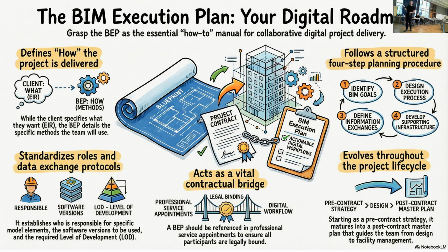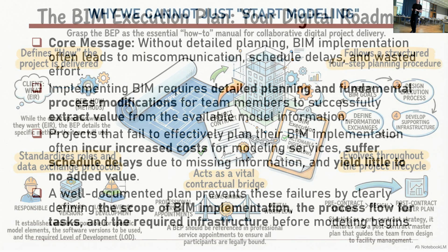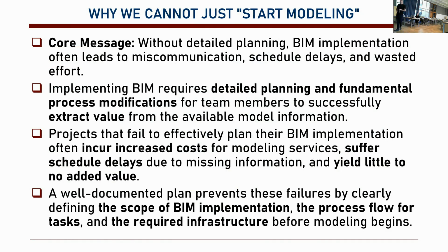Basically, that's the BEP. Prior to the project, we have a pre-contract BEP. Then it's given to the members, and they basically work on it. Then after the contract, it is updated, and whenever necessary it gets updated, because through the project, you may need to do that, okay?